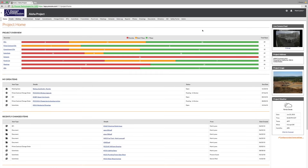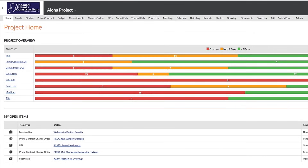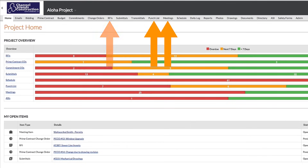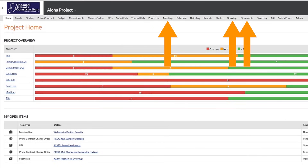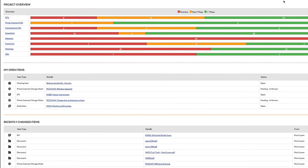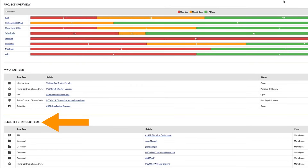Procore's project dashboard provides an overview of the most important project data, including special communication items such as submittals, RFIs, punch list items, meeting minutes, drawings, document uploads, and more. Every user sees a list of open items that need their attention. Recently changed items are also listed so that Procore activity for each project can be monitored at a glance.